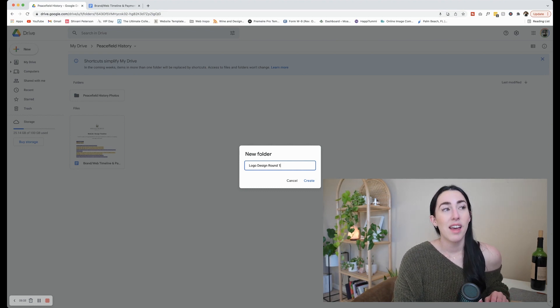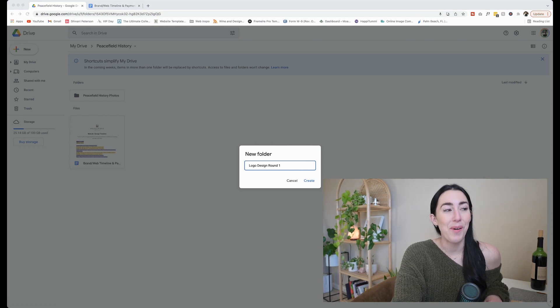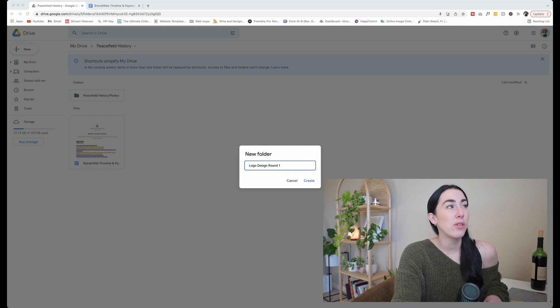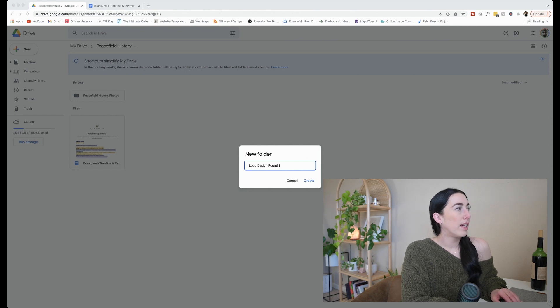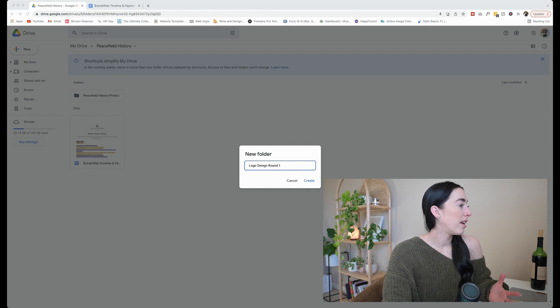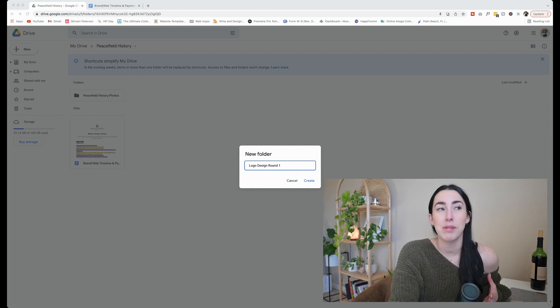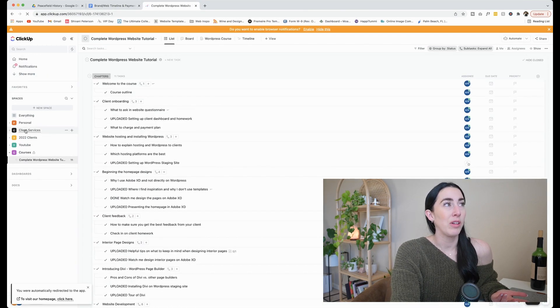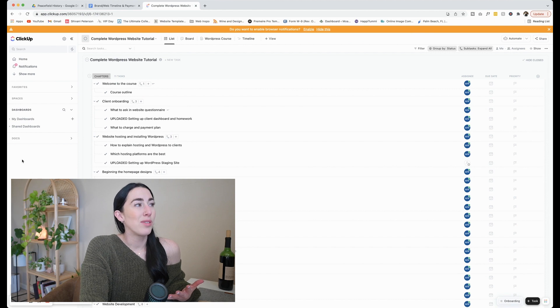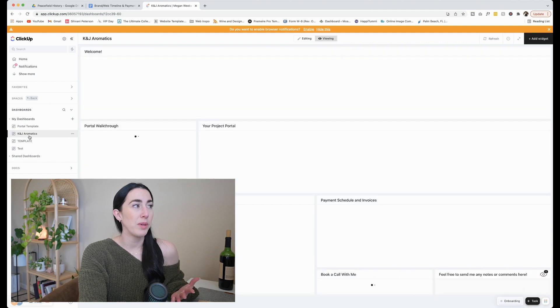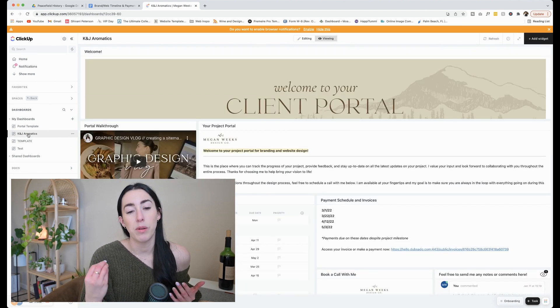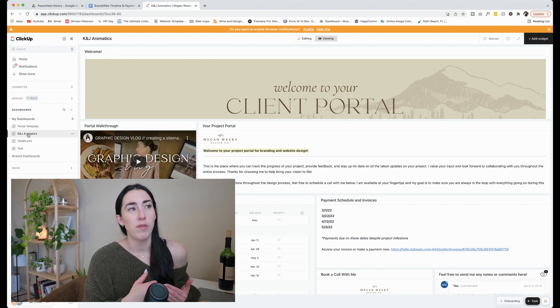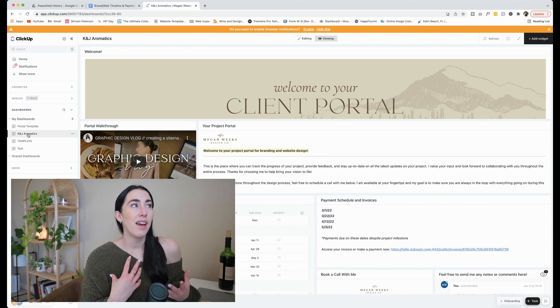I'm also going to create some folders in here called peace field history photos. That way she can provide me that before we begin the website design. That's something that's really important to get from your clients. Another thing, another folder I'll make is, so once I start creating the logo designs, I'm going to create different folders. So this one will be logo design round one, I'm just going to call them rounds. That's typically what I refer to them as. And then depending on the revisions, I'll have a round two folder, a round three folder. That way we can reference back the very first revisions. Because I find that clients, sometimes we get to the second revision and they're like, actually going back to the first round, I really like this. So it's nice to have all of those rounds of designs for them to reference.